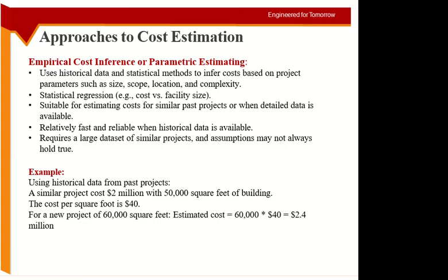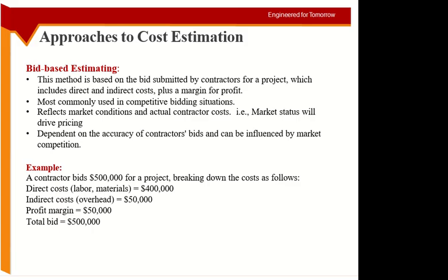But the problem with this method is you have to find out the projects which you can rely on, which are similar. And then you have the time factor as well. A project which was done 5 years ago may not give you the rate which you can directly use on your project, because there's inflation and rising prices and new technology and so many things. So this is a thing to be considered for this type of approach.